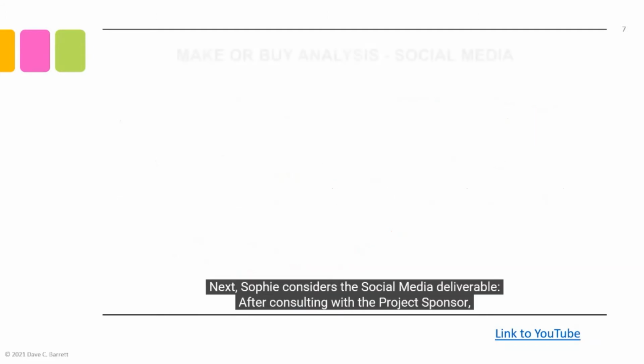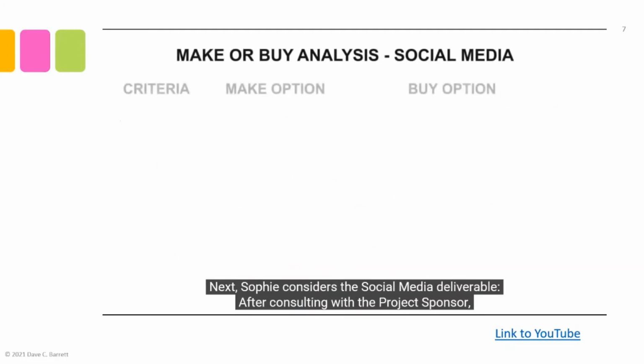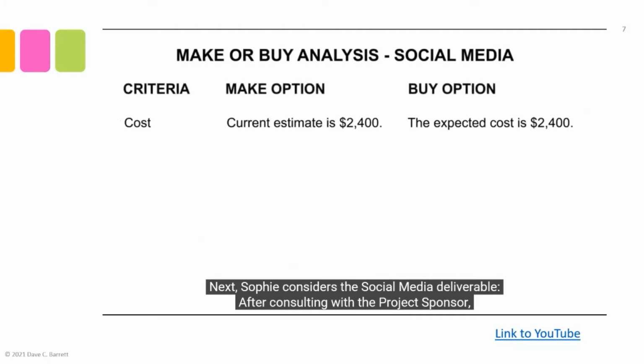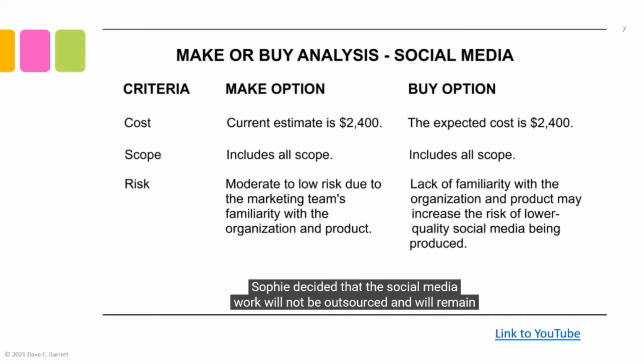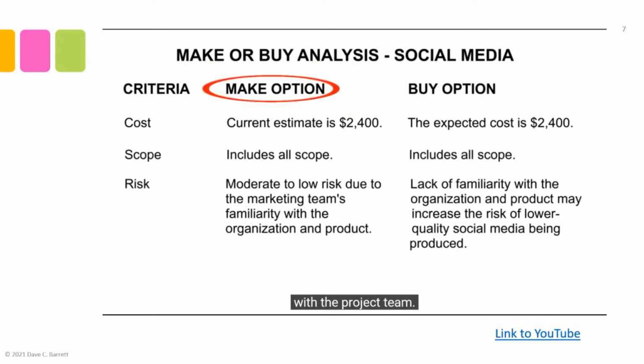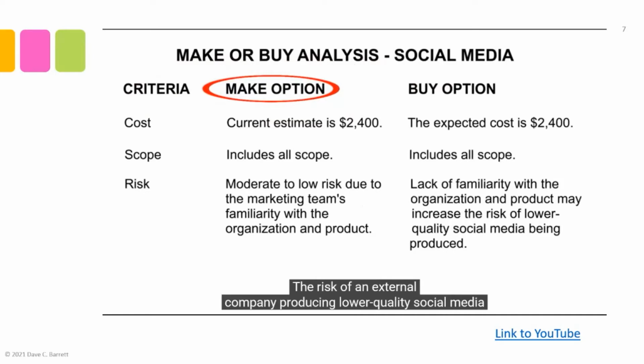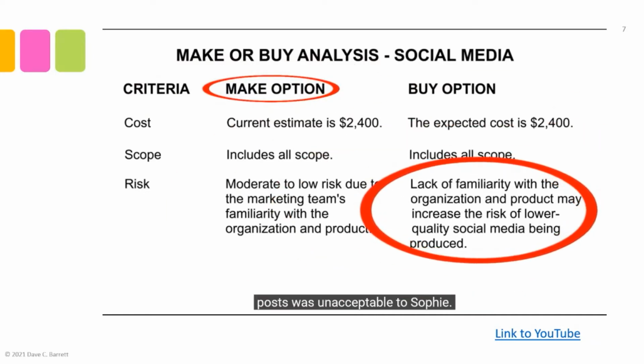Next, Sophie considers the social media deliverable. After consulting with the project sponsor, Sophie decided that the social media work will not be outsourced and will remain with the project team. The risk of an external company producing lower quality social media posts was unacceptable to Sophie.